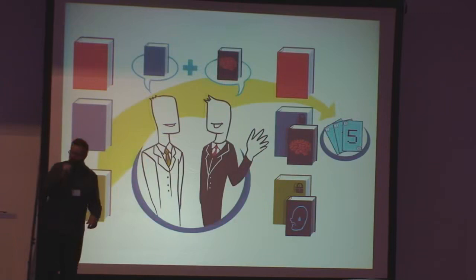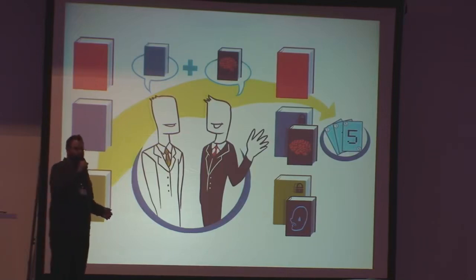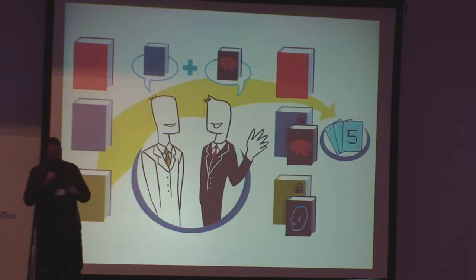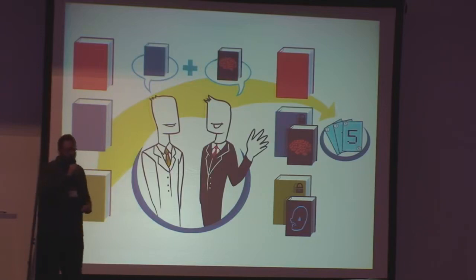So phase 3, we decided to put this into action. The process now was that before planning, the security architect would meet with the product owner and go through the product backlog. So we would look at what's at the top of the list for what's likely to be done when the next sprint starts, and do that same review. Go through the stories, find out which things have possible security ramifications, and now we actually started tracking the security work to be done in more detail along with those stories, the same way developers were tracking the work to be done.